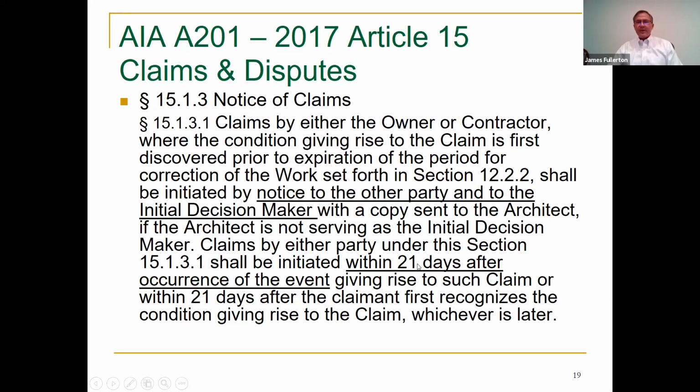Claims shall be initiated within 21 days after occurrence of the event giving rise to such claim, or within 21 days after you recognize the condition. Now, I underline 21 days, focus on that. That's a very generous deadline as far as I'm concerned. That's one reason you like the AIA document better than a lot of other ones. 21 days is a long time. But also notice in the following slides what happens to that 21-day time limit.